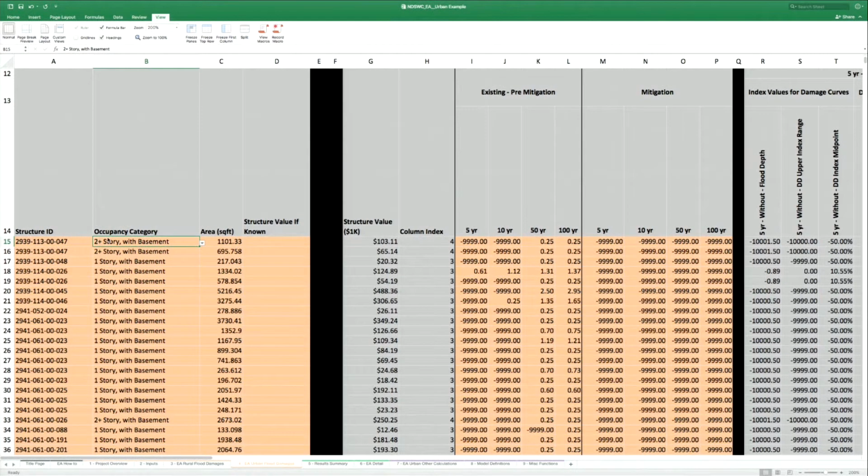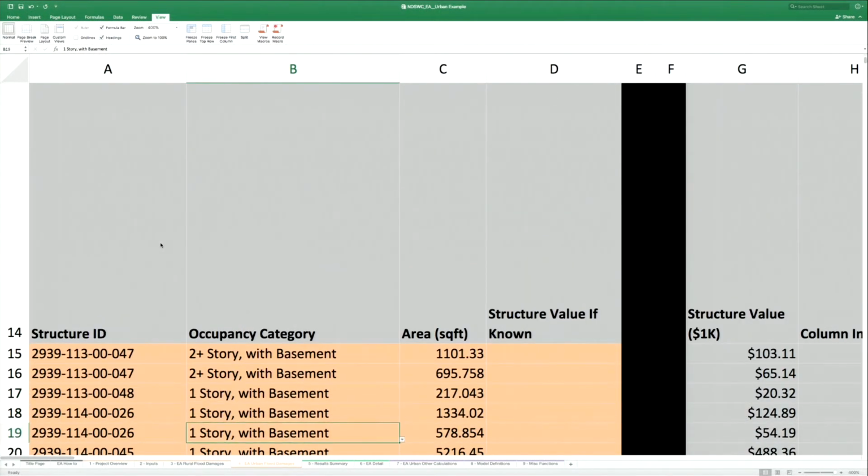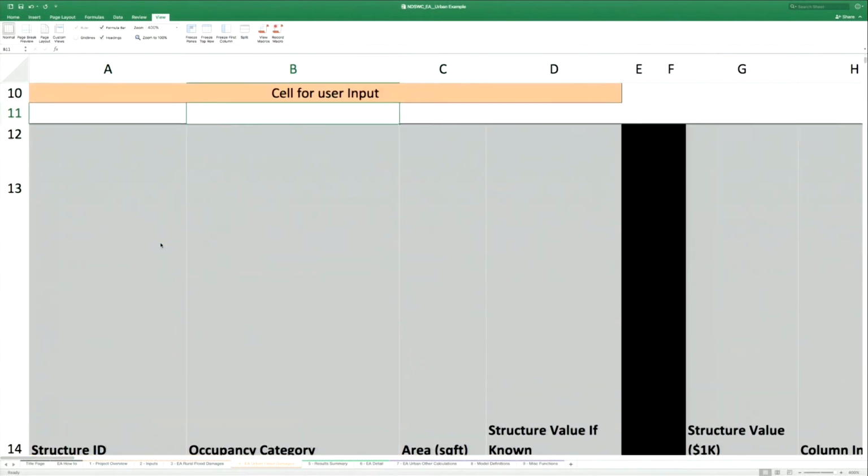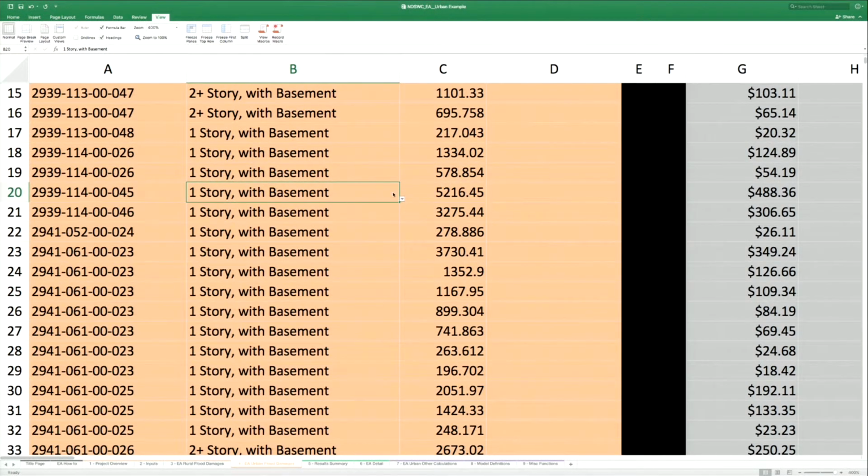Here, I want to point out a difference between the urban and the rural. In an urban setting, if your house gets flooded for 2 minutes, that's damage. In a rural setting, it depends on the time during the growing season and what crop it is. There are some crops during certain parts of the growing season that can be underwater for 3 days. Yep. And there's a very complicated chart for this part of the country that shows how much water each type of crop can take during different periods of the growing season in order to affect harvest. So that's a big difference between your house flooding and a cornfield flooding.